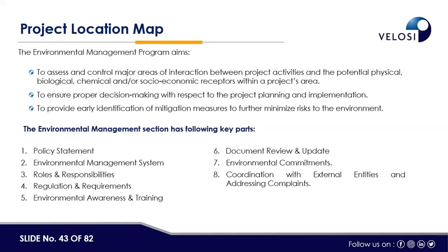Yeah. Then another question, is it possible to have all three EMPs combined into one report? Basically, it's not the case. If that is the case, then definitely there is an EIA, environmental impact assessment, in which we have to cover the life cycle of the project, starting from the construction, operation, and if there is any decommissioning as well. But again, it's up to the regulatory authority. If they feel that we can cover all three together, then it can be possible, like the case study that we are presenting, in which a regulatory authority asked us to cover construction and operation both. So we have developed an OCMP. But normally it's a very rare case in which we can merge or integrate all the management plans together.